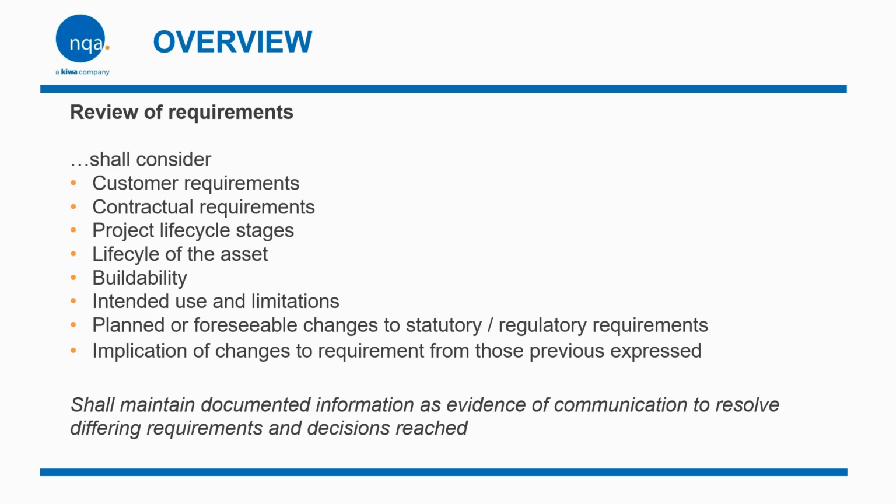Intended use and limitations: understanding how the product or asset will be used, including any constraints or restrictions. Look at planned and foreseeable changes in statutory or regulatory requirements. It's asking you to anticipate any upcoming legal or regulatory changes that might impact the project, and the implications of change to previously expressed requirements. Assess how modifications to initial requirements affect scope, design, cost, or timelines.